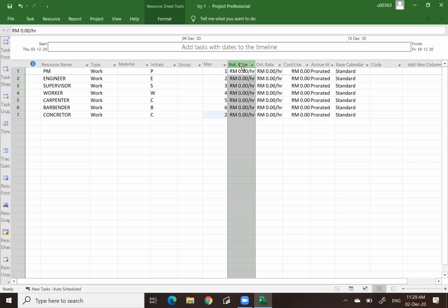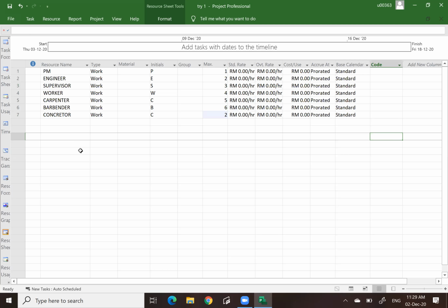And another one is basically you input the rate if you know the rate. But again, the issue in Malaysia, we do not use the hourly rate most of the time. And then when you input this value, you add up with machine, you add up with material, then it will not tally with the contract document. Whereas this thing is to be shown to the client. That could be the issue. And then, this is just an example. You input the machinery.